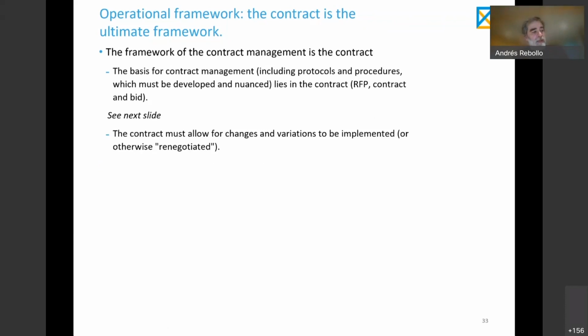For the CP3P guide and for some countries like Australia, renegotiation is looking for a solution that is not contemplated or incorporated in the contract. We need to deviate from what is described in the contract to be able to look for that solution. In some countries, that cannot be done, mostly in civil code countries like Spain, for example. So how can it be done?